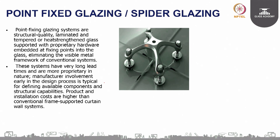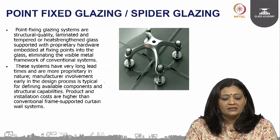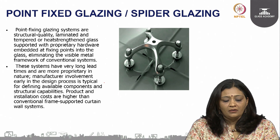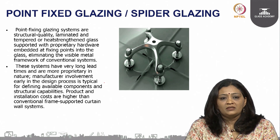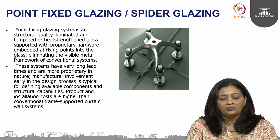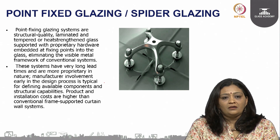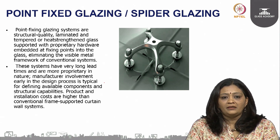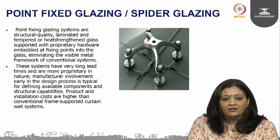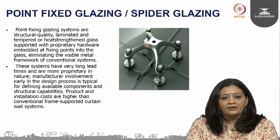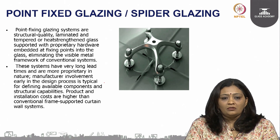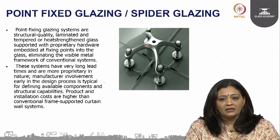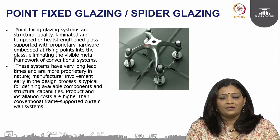In point fixed glazing, laminated, tempered, or heat-strengthened glass is fixed using point fixings called spiders, which are connected onto glass fins. These systems have a very long lead time, are proprietary in nature, require manufacturer involvement early in the design process, and have specific component and structural capability requirements. We will be dealing with structural calculations for all these types of glazings.